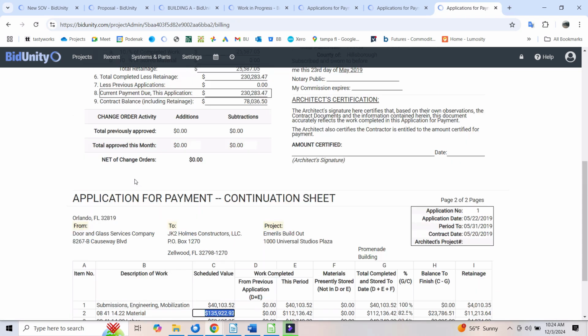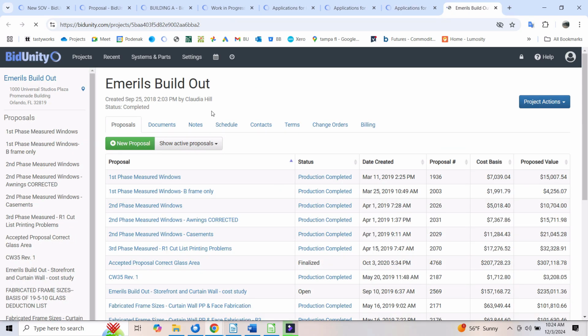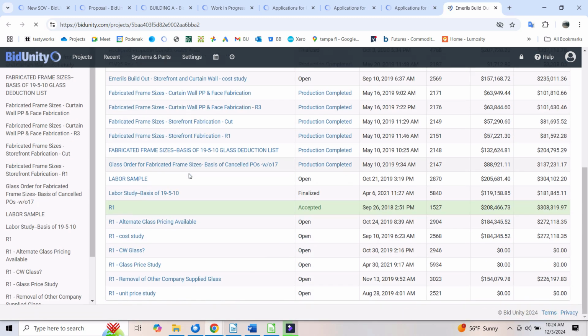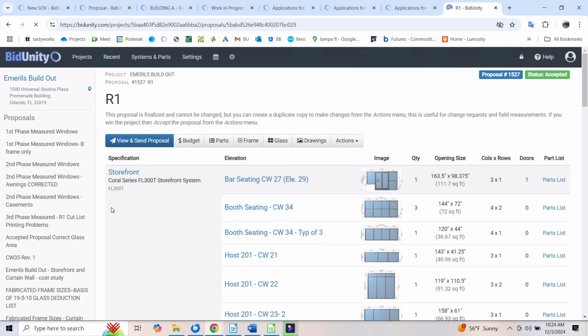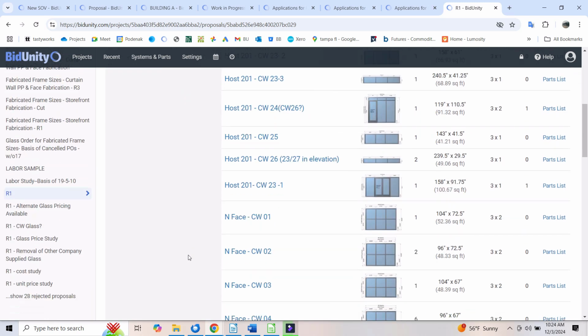Well, the contractor said to us, hey, we need to get the wood installed in the building, and we need to condition the wood, so we need to get the building enclosed, and we need to get the air conditioner going. We need the wood conditioned so that when we install it, it doesn't warp and bow when we enclose the building. So we're going to have another company basically board up all of the frames that you put in, and this is the scope of the job.